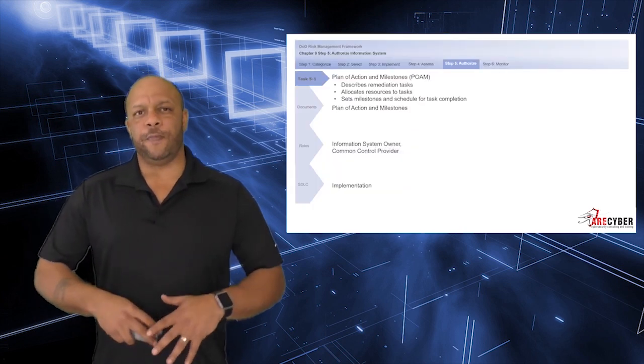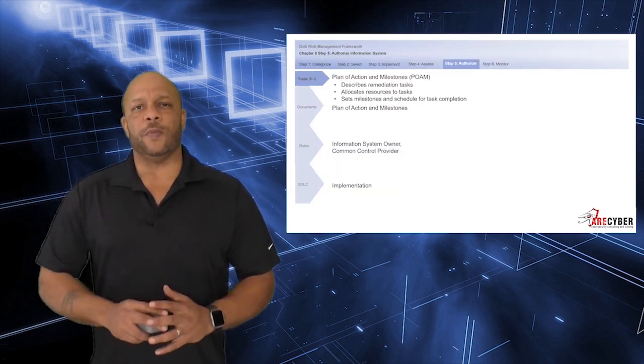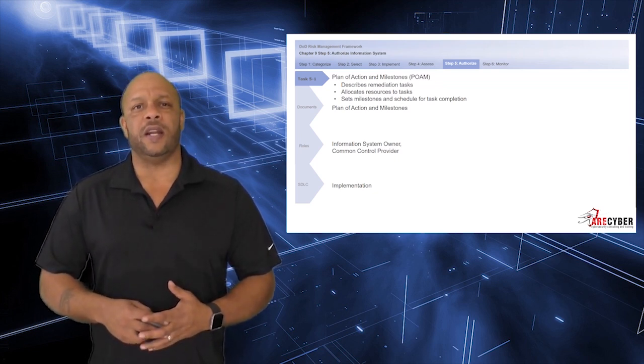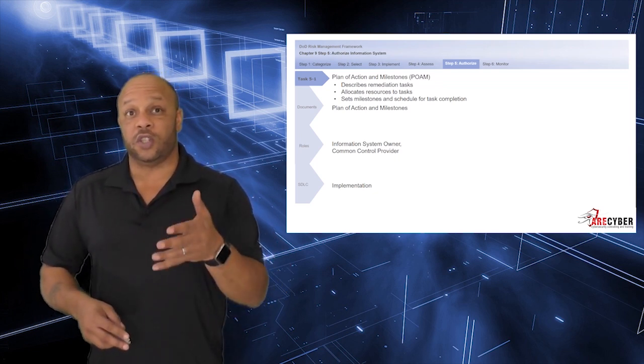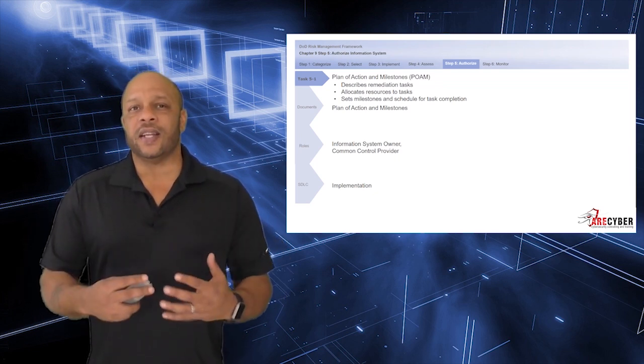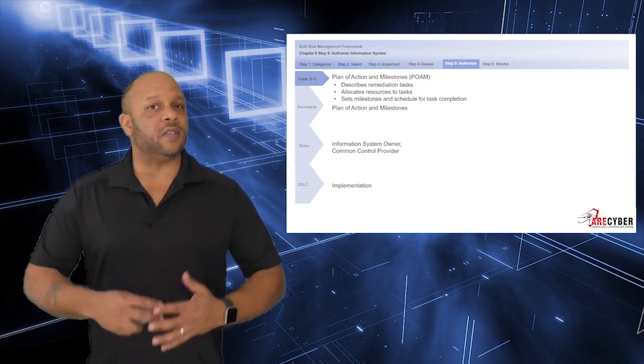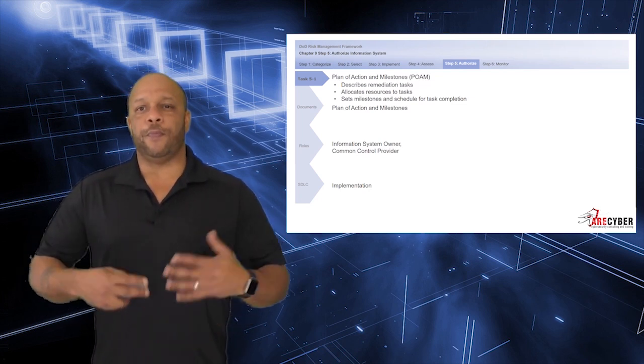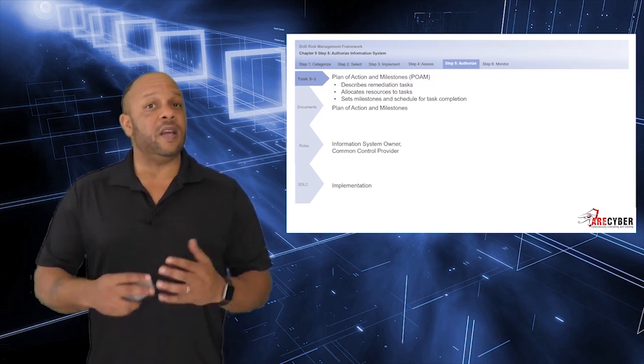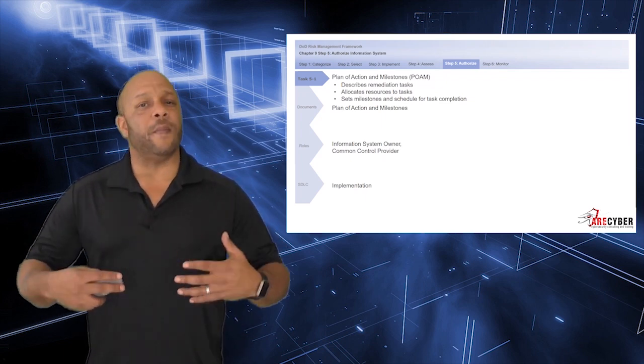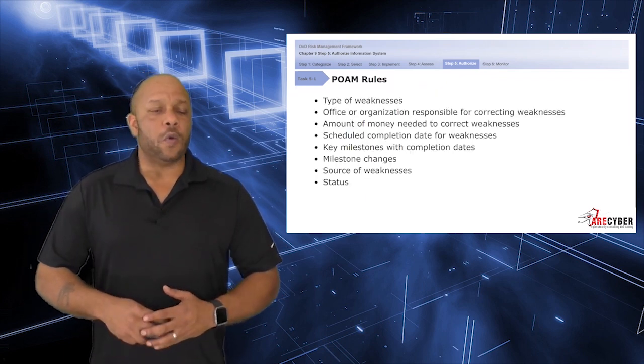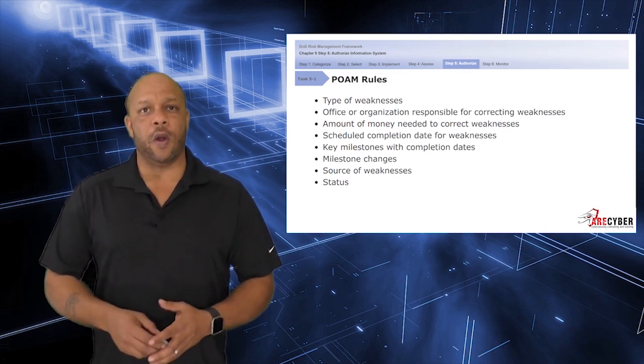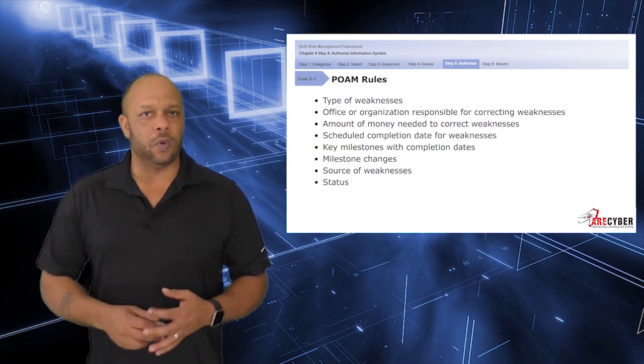Starting with the POAM, this is the document that describes the remediation tasks associated, allocates resources to those tasks, and sets the milestones and schedule for those tasks to be completed. The primary task owner of the POAM is the information system owner and the common control provider. When it comes to creating and managing a POAM, there's only a few simple rules.